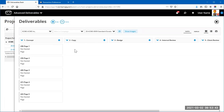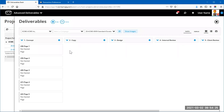In the Task View I can see the tasks in this schedule — first task is Concept, second is Copy, and so forth. I've already added pages here — maybe this is a five-page brochure and we're managing each page independently. Sometimes some pages get approved right away while others need many rounds of review. If you need that level of detail, split it out per page — it's more work, but you can see exactly how everything is progressing.